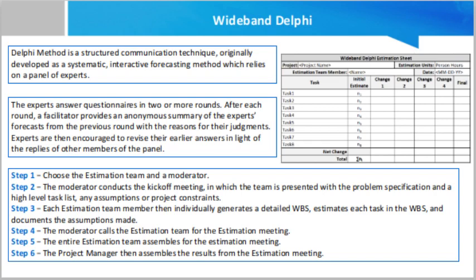Step 3 — each estimation team member individually generates a detailed work breakdown structure, estimates each task in the work breakdown structure, and documents the assumptions made. Step 4 — the moderator calls the estimation team for the estimation meeting. If any team members respond saying their estimates are not ready, the moderator gives more time and resends the meeting invite.